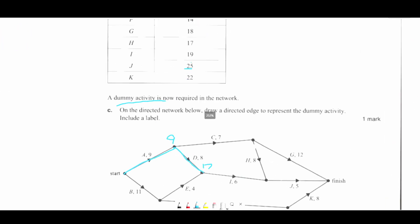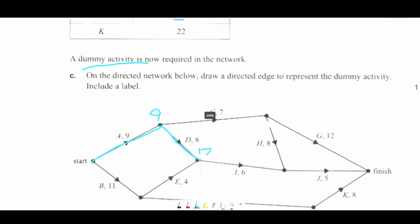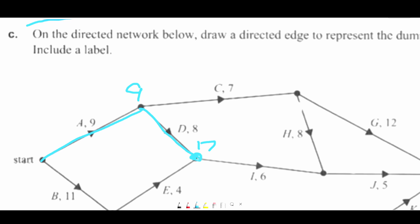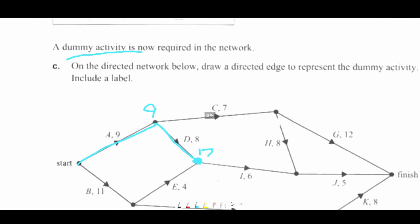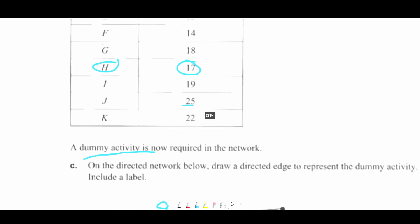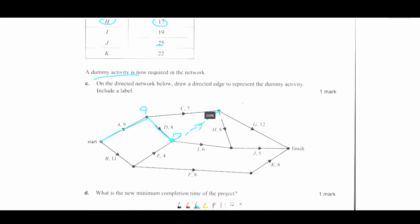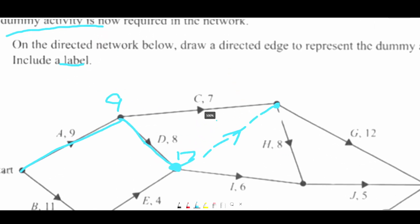So we would think that I would be next. And we would think that this would be 17. But this is now 19 for some reason, which means the dummy activity is going to start somewhere here. So where is 17 being happened? 17 is being happened at H. So where is H? H is here. Therefore, there should be a dummy activity going like this. Include a label. I'll call it dummy.